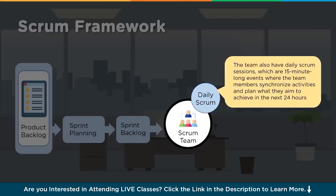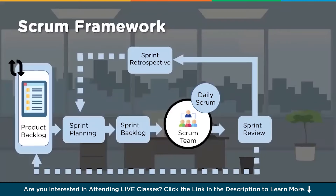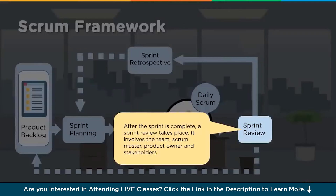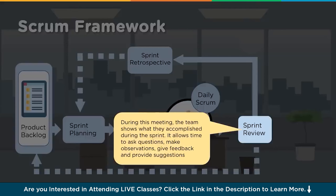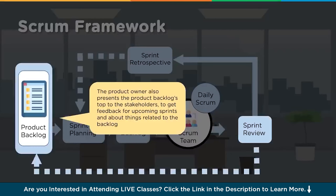If further discussions are needed to correct issues from the daily scrum, those can be taken as a separate meeting - not as part of the daily scrum. Generally the daily scrum meeting is 15 minutes and should not go more than that. The sprint review happens once the sprint is complete, involving the team, scrum master, product owner, and stakeholders to understand what was agreed upon and what was delivered. The team shows what they accomplished during the sprint, allowing time for questions, observations, feedback, and suggestions.